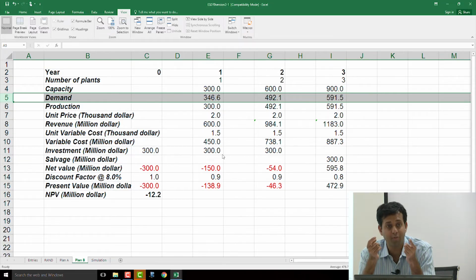What will I do with demand after first year? So one way of looking at it is, I don't look at MARR or whatever, I look at the demand after first year. If the demand after first year was good, I build a plant. If the demand after first year was not good, I don't build a plant. Now, this is the whole point of that flexibility, the whole point of plan B is I now have that ability to build or not to build.